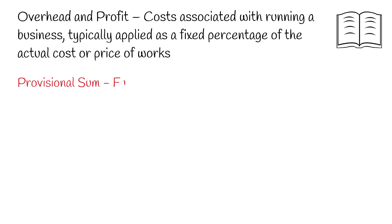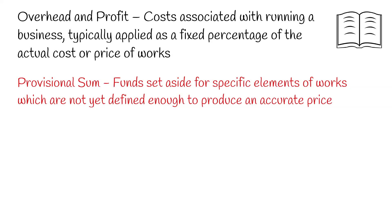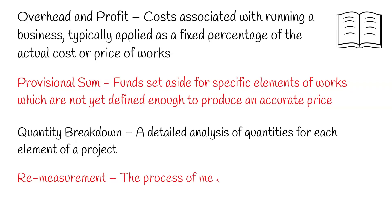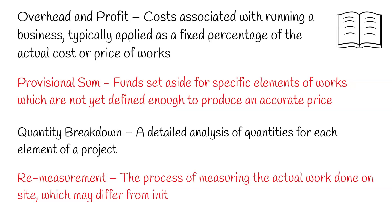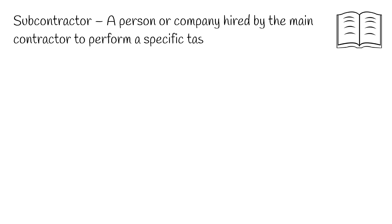Term 15. Provisional Sum — funds set aside for specific elements of work which are not yet defined enough to produce an accurate price. Term 16. Quantity Breakdown — a detailed analysis of quantities for each element of a project. Term 17. Re-measurement — the process of measuring the actual work done on site, which may differ from initial estimates. Term 18. Subcontractor — a person or company hired by the main contractor to perform a specific task as part of the overall project.